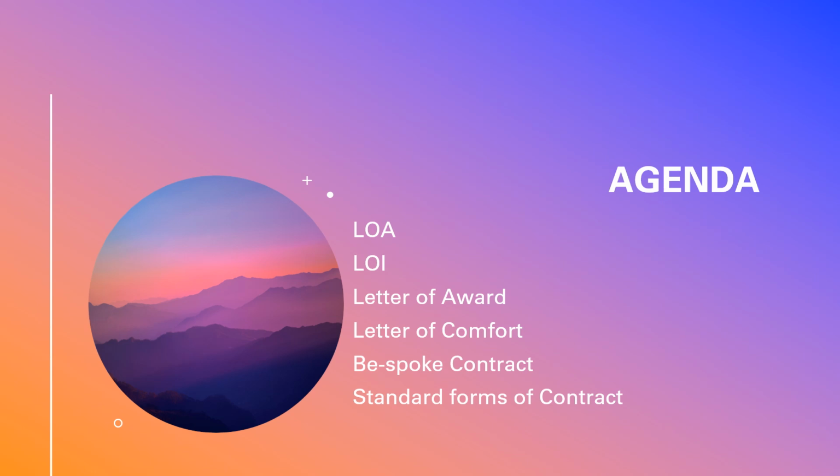And sometimes you issue a LOA as a two or three sheet paper also, in which you will write this LOA is the agreement between party A and party B for this scope of work, and this is the amount agreed, and this is based on the tender issued on this date, tender addendum issued on this date, PTC on this date, negotiation on this date, BAF on this date, LAF on this date. So it becomes implied. When you sign, the party is supposed to have full knowledge of all these items listed.